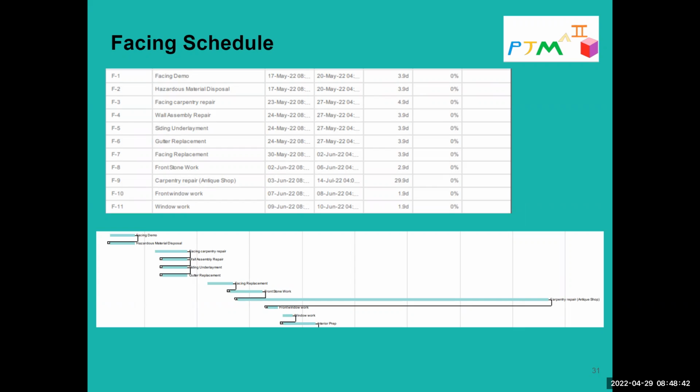One thing I'd like to add about all the exterior stuff, or even the interior stuff for that matter, is we added a lot of extra time for a lot of everything, just because we don't know what's under a lot of this stuff. We could find asbestos. We already know there's lead paint. We could find, frankly, termites maybe. Anything's possible on this project, and we just added a lot of extra time on our schedule just so it doesn't surprise us and we aren't going to lose money due to some sort of bottleneck that we come across. If we pull down drywall or siding, we might just find crippling rot of the structure.